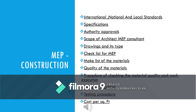The procedure of checking material quality and work at execution is important. There will be many works happening in parallel at a site at different times. Workmanship matters a lot — due to poor workmanship we can face a lot of quality issues. So checking will be done by proper methodology. Similarly, for material tracking, some items will be long lead and some will not be critical — we should know which is critical and track accordingly.